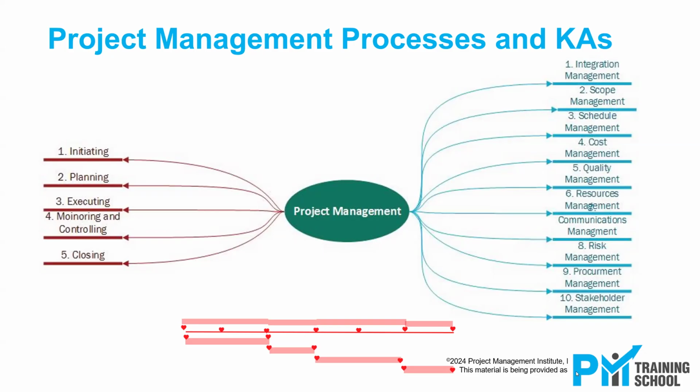If your project is too intricate, maybe you need to have more phases. So go up to 7 or 8 or 9. But beyond that, you must stop and think, is it really justifiable to have more phases in it? What you can do is broadly classify your project into 5 phases. And if there are complications, you could create sub phases within your phases. That way, you can handle the complication. Your answer is very correct, that I also would appreciate not more than 5 phases.